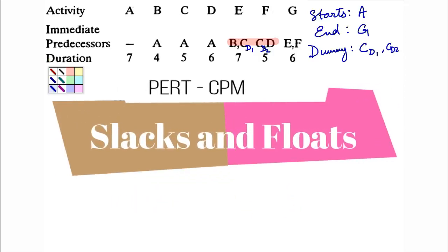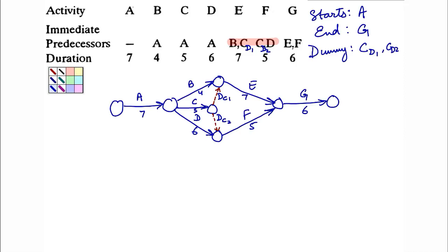What is the procedure that we follow? First, you need to find out all possible paths from the first event to the last event — from the start of the project to the end of the project. How many paths are there? A, B, E, G.